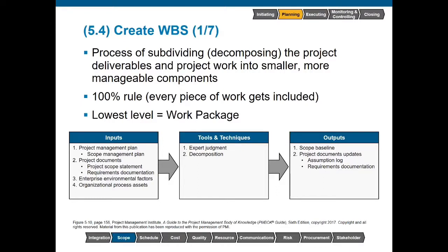No, we're still going to have to do it. But now it's going to be a matter of trying to go back and ask for more money. That's obviously not a good look as a project manager. The lowest level that we will see on the work breakdown structure is the work package. We're going to talk about the definition of a work package in a couple slides, but the word I really want you to associate with WBS is deliverable. All right, we are concerned about the product, service, or result that this project was undertaken to create.